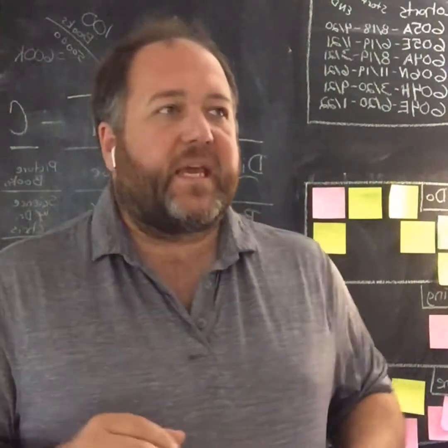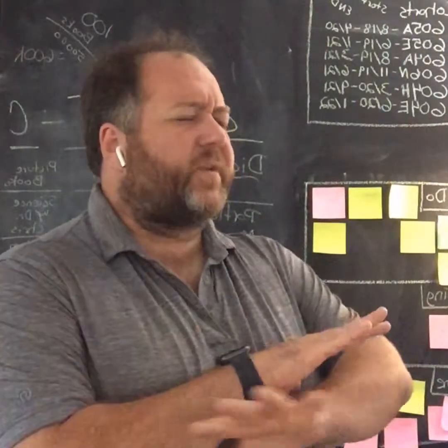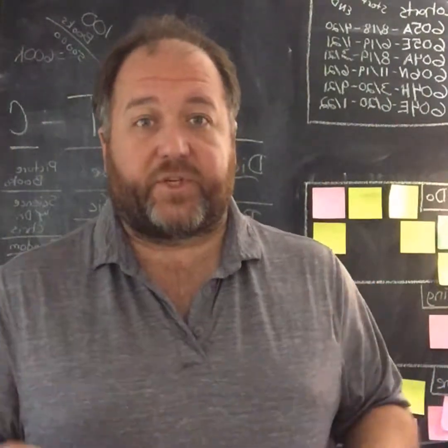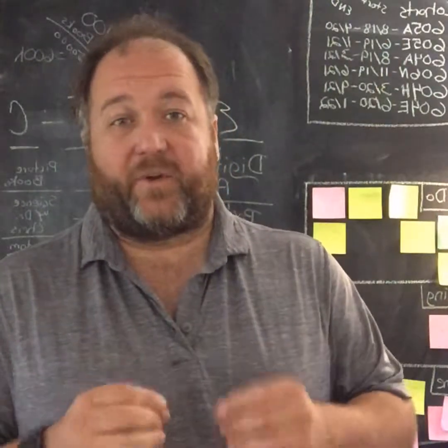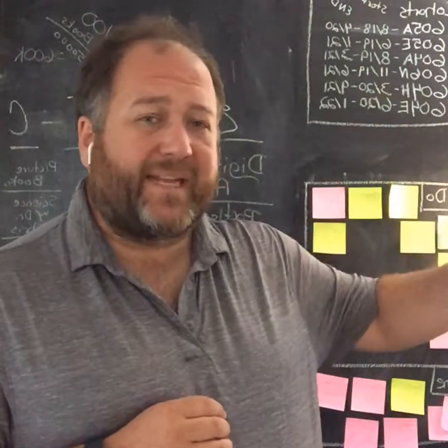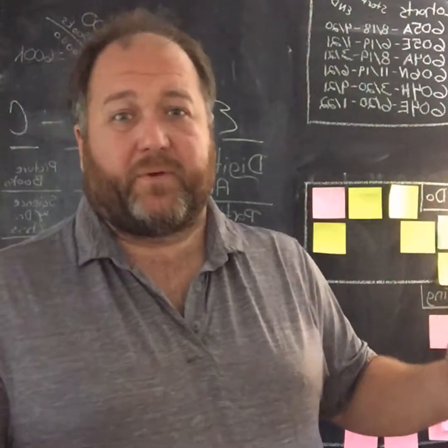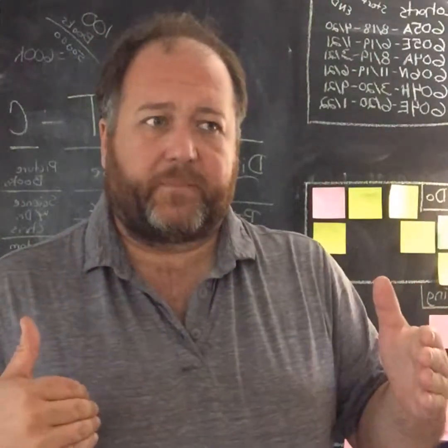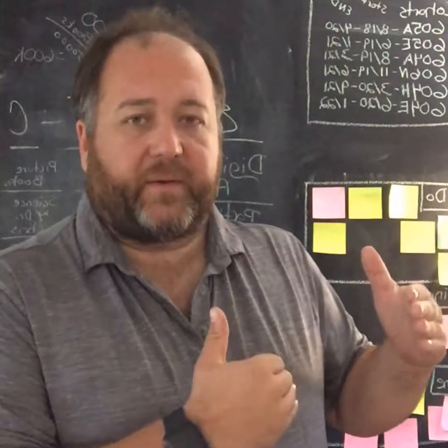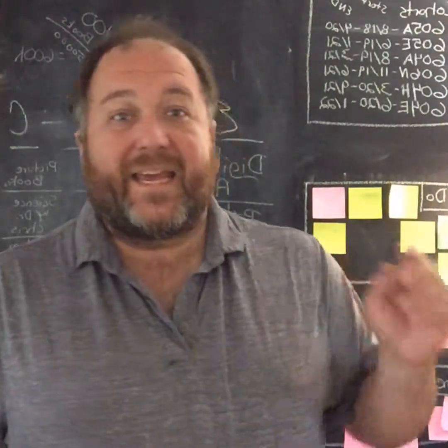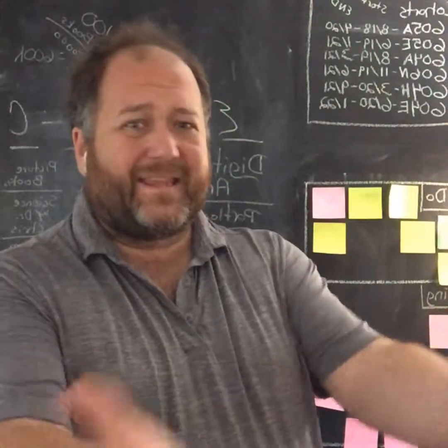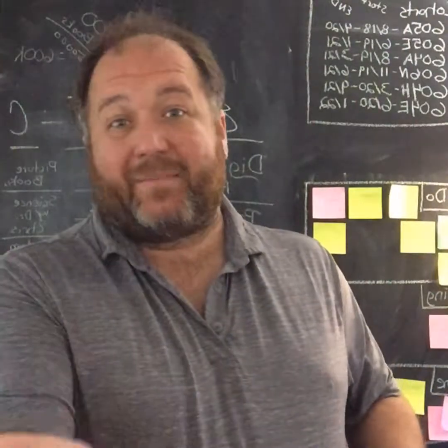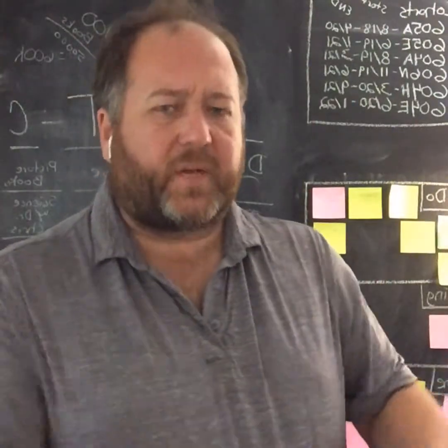And then the third thing is change management. I can't stress enough how critical it is to have formal change management procedures for when a project is underway. You had the project plan and the project scope signed off on by some authority, and you'll need to make sure that any changes to the project go through a similar approval piece. And this could be as easy as emailing your boss and saying, hey, this is the change that people want to make, and here are the consequences of that change. And you maybe get an email back, and that's your paper trail. You just add that to the project documentation.